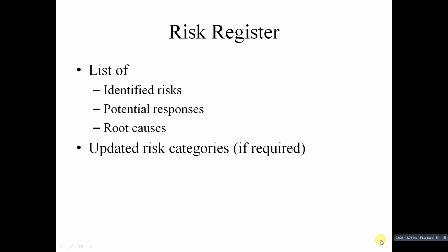Then the category under which the risk event falls. For example, a defective server might fall under the broader category of technology or hardware technology. So you have to mention the category under which the risk event falls. It may be hardware, it may be software, it may be network, likewise.